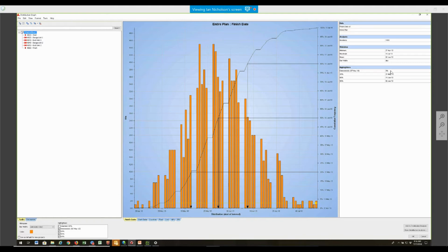And this is what we call the parallel paths effect. The parallel paths effect says if you've got multiple parallel paths in your schedule and more than one of them could go critical, you're going to end up with a very low probability of achieving your end date. Because that poor finish milestone is getting pushed. If unit 1 is late, it gets pushed. If unit 2 is late, it gets pushed. It's no coincidence that if you take 18% and multiply it by 18%, you get 3%. I think I've got a slide for that. Let me flip over to it here.